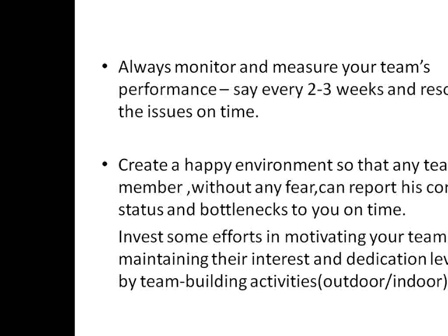And then try to resolve the issues on time. Suppose one of my team members is not performing well, I can maybe delegate his piece of work to somebody else and exchange the work. Give him a low complexity work, give the higher complexity work to a team member who is performing better than him. Because nowadays it's very difficult to remove a team member and hire a new team member.